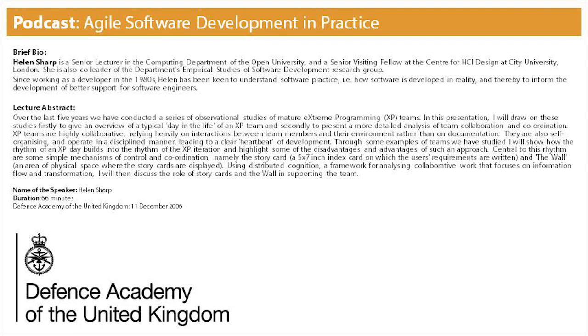You have a sort of a larger scale view of development as well, which is called a release. And releases might be every 3 months, might be every 6 months, might be every month. It really all depends on the team and the kind of development that they're undertaking. And that has a very similar kind of pattern to the iteration. So I won't be talking any more about that as such, but it's a similar kind of thing.